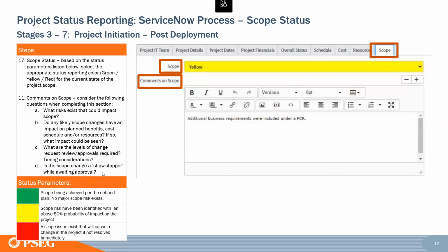And then, are there any showstoppers? That's really starting to think about, if this is an area that requests a lot of last minute scope changes, what's our ability to leverage additional phases? Just because they say they want it now doesn't mean that we can't negotiate. Hey, we only have this budget and this time for this project. Can I initiate a phase 2? And you wait for that phase to get whatever this is additionally. So there are some options there for problem solving where scope exists.